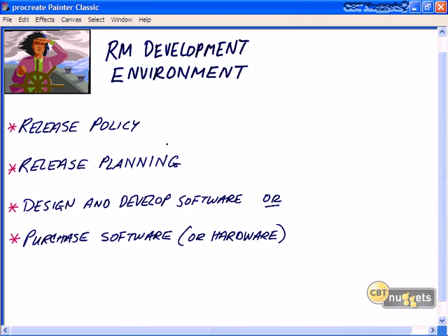You'll also determine during the release planning process what level the configuration items can be independently distributed of each other, these release units. Do they need to be released as a package, or can they be released independently? You have to evaluate during the planning, design and development the potential impact of the release: how many person hours it's going to take, the life cycle of the process, how difficult the installation is on the production side and the impact on the end user, also the complexity of dependencies between software and other software, software and hardware, and the overall IT infrastructure.